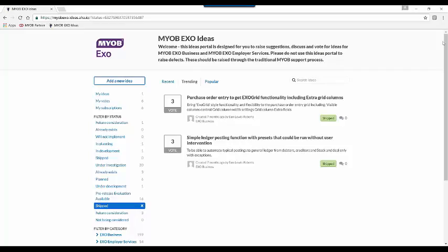Quite often organisations will develop a significant... Just on that point, the use of the quote budget tab, even if you don't transfer those lines through to the cost tab, is really significant in the analysis tab. You go in and you've got the widgets that produce the graphs. That's where you're going to get the best overview of that information in a comparative sense. It's going to give you a bar graph with lines for what you quoted, lines for your actuals, and lines for your invoice as well.